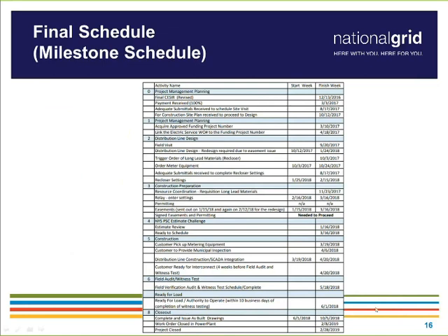And here we show that as 6/1. And just to give you some examples, in here we had the field visit, which had to be done on September 20th of 2017. The recloser settings had to be done between January 25th and February 15th. Permitting, there's no permitting associated with this, but there are easements.